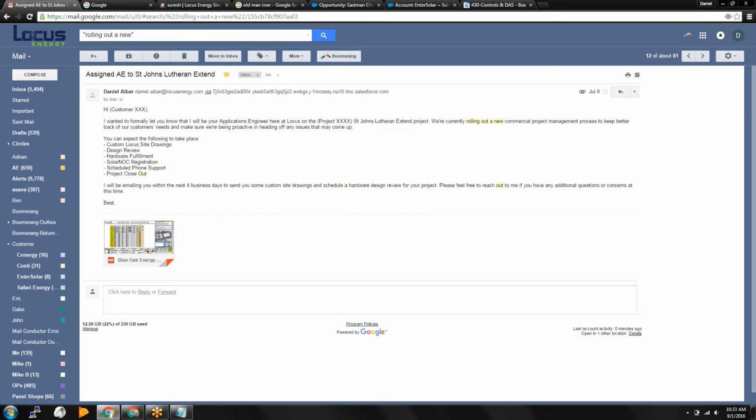So something like this. Here's just a sample. So, hi, customer. I wanted to formally let you know I will be your applications engineer here. We're currently rolling out a new commercial project management process, and you can take the following next steps. So we're going to send over some custom drawings, effectively the drawings that we did before, but we will update them. We will do a design review, and then your hardware will be fulfilled, the platform will be registered, and we'll do some remote commissioning activities such as phone support and closeout. So this is just a sample.